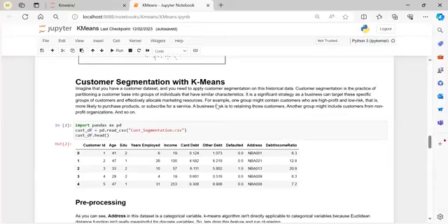And then once they approve it, after that we will submit the SOW, known as Statement of Work. In the Statement of Work, we clearly specify who will be responsible for what. The customer will be responsible for what, and the vendor, that means the service provider, will be responsible for what. We will also define the scope again in a more detailed format. The SOW will be signed, and after that multiple agreements will also be signed.